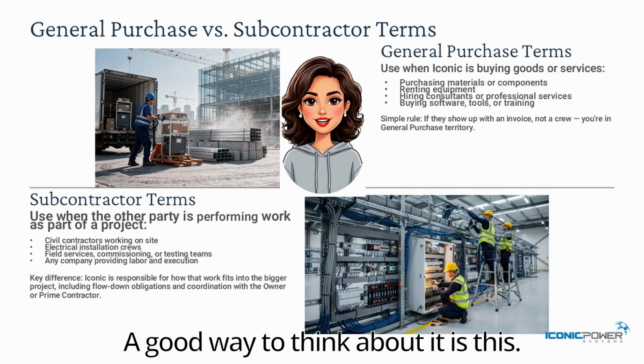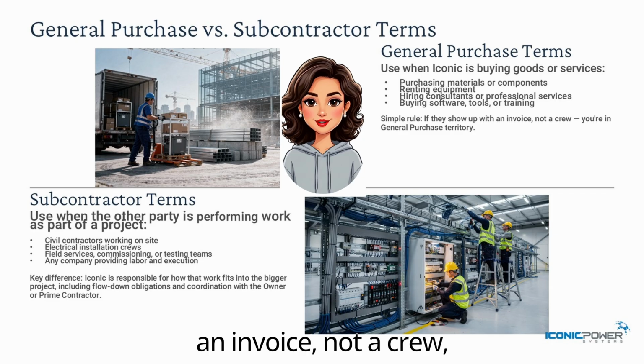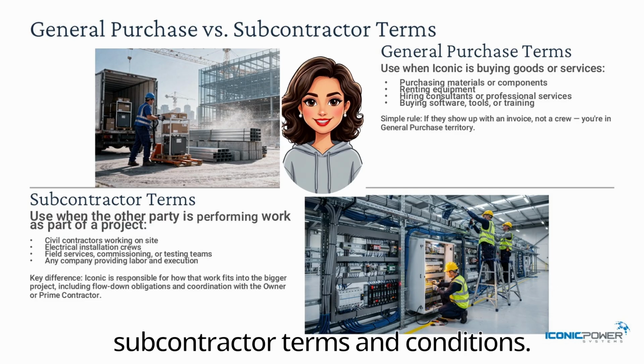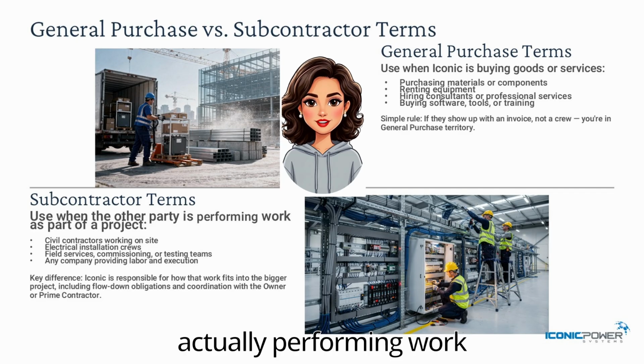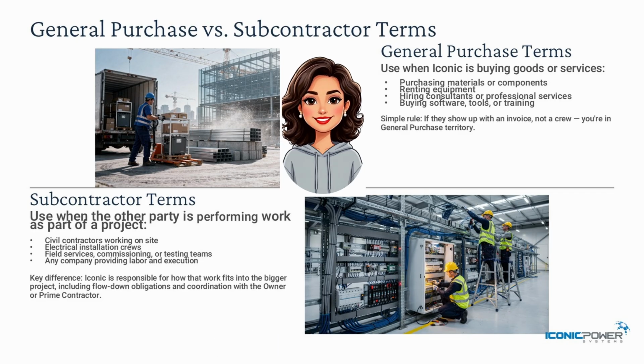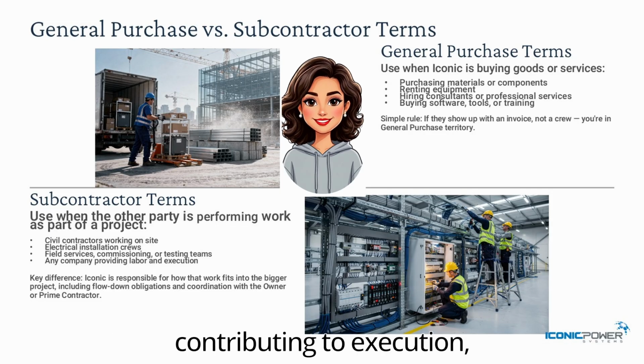A good way to think about it is this. If they show up with an invoice, not a crew, you are probably in general purchase territory. Now, let's talk about subcontractor terms and conditions. You use these when the other party is actually performing work as part of a project. This means they are on site, they are contributing to execution, their work becomes part of Iconic's obligations to the